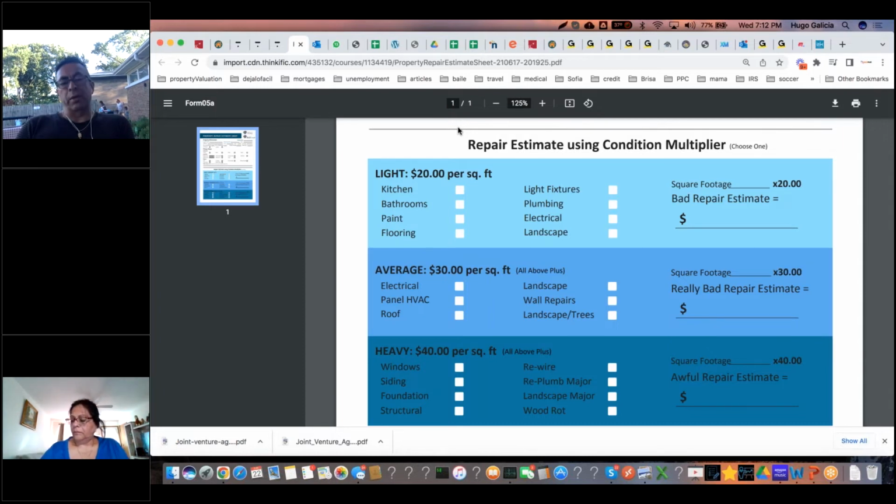And something about payment that is very important: you never want to pay them up front. The only contractors that you pay up front are for windows. You're going to be required to pay 50% up front for windows, perhaps HVAC, it depends on the contractor. And then kitchen cabinets, you're going to need to pay 50% up front. But for the rest, you always want to be in arrears. You pay them on a weekly basis, based on milestones. Okay, what have we completed this week? So you pay them based on that.